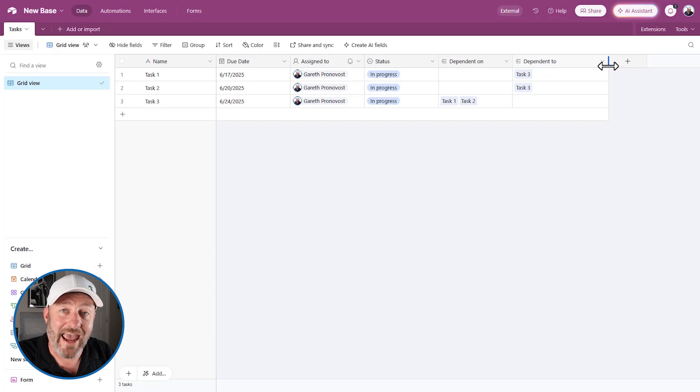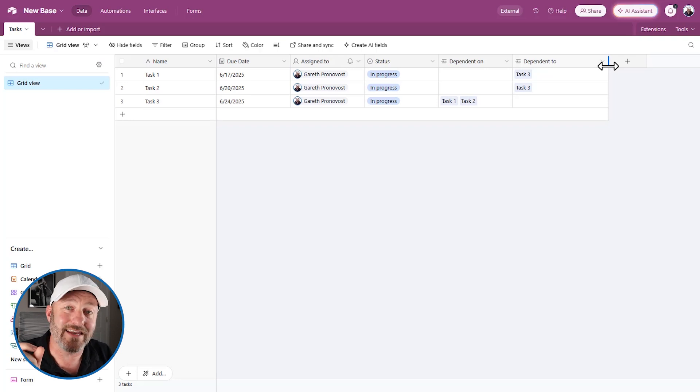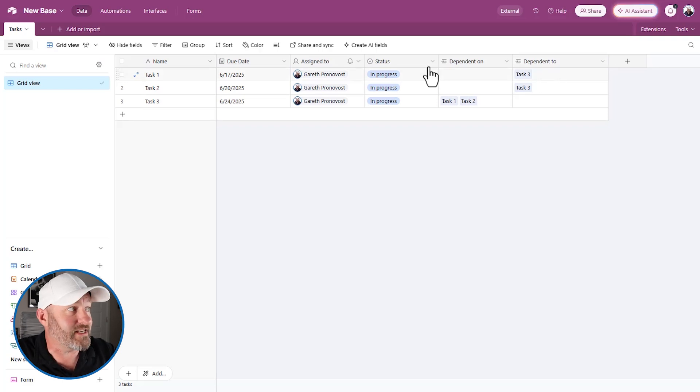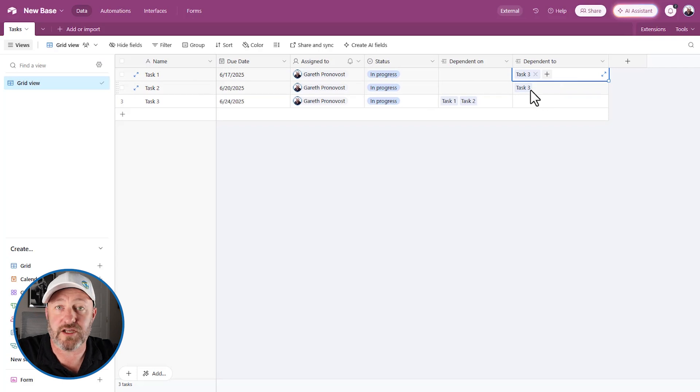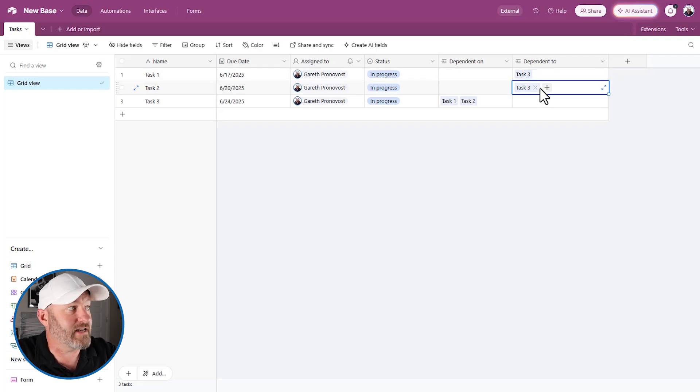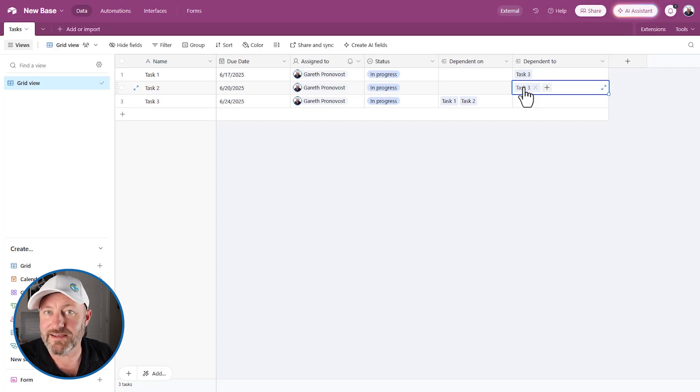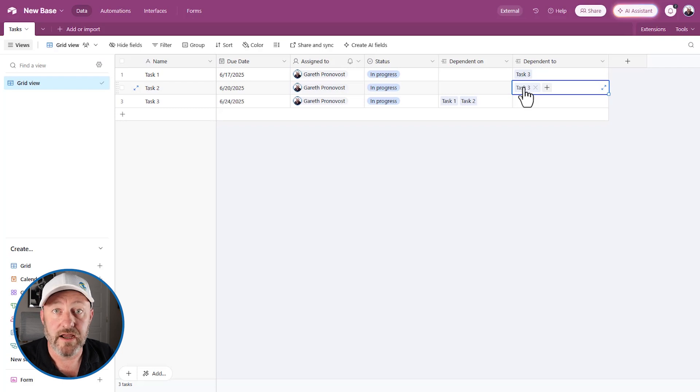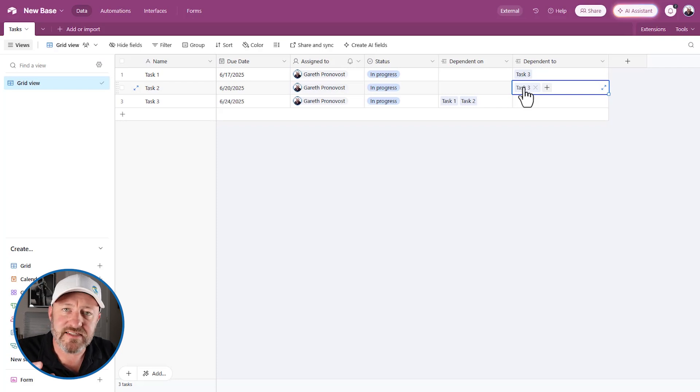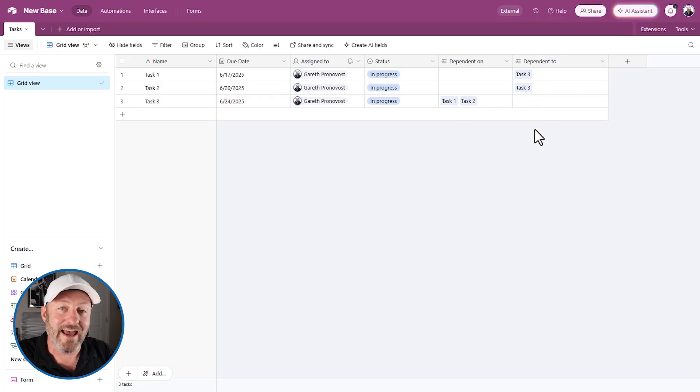Another great example is what you see before you here, dependent tasks, especially when you're employing Gantt charts in your interfaces and Airtable views. This is really important to see. Not only do you now see what the task is dependent on, but you see what other tasks are relying on this to be completed. So we can see at a glance now that we need to complete task one in order for task three to be ready or in order for it to be possible to complete, because it's relying on us to complete one and task two, because you can see the dependency here. So these types of examples are plentiful. We can think of a lot of wiki pages that we might create with Airtable data saying that people wrote multiple articles and what articles were they written by and rolling that back up. Many, many self-linking relationships that we've needed automations in the past in order to create this functionality. And now it's readily available at a glance.